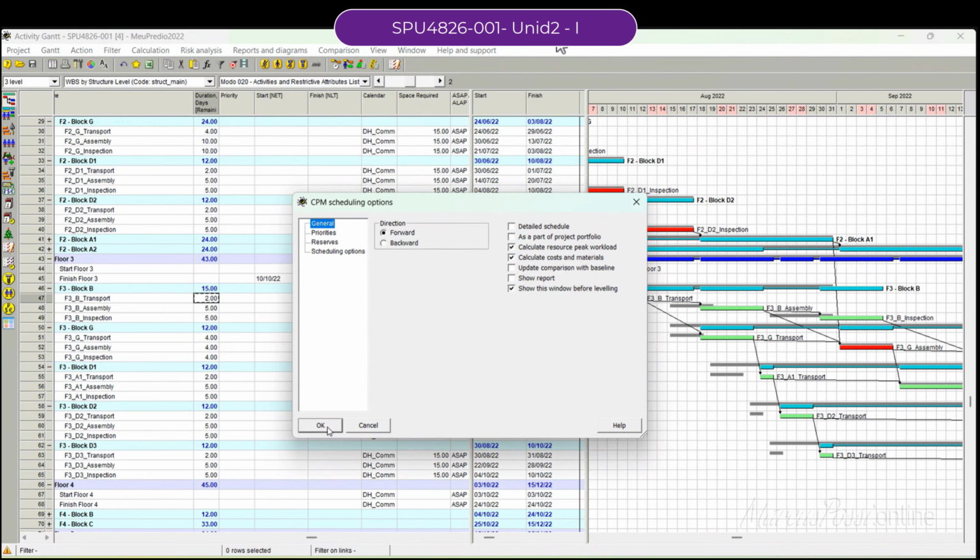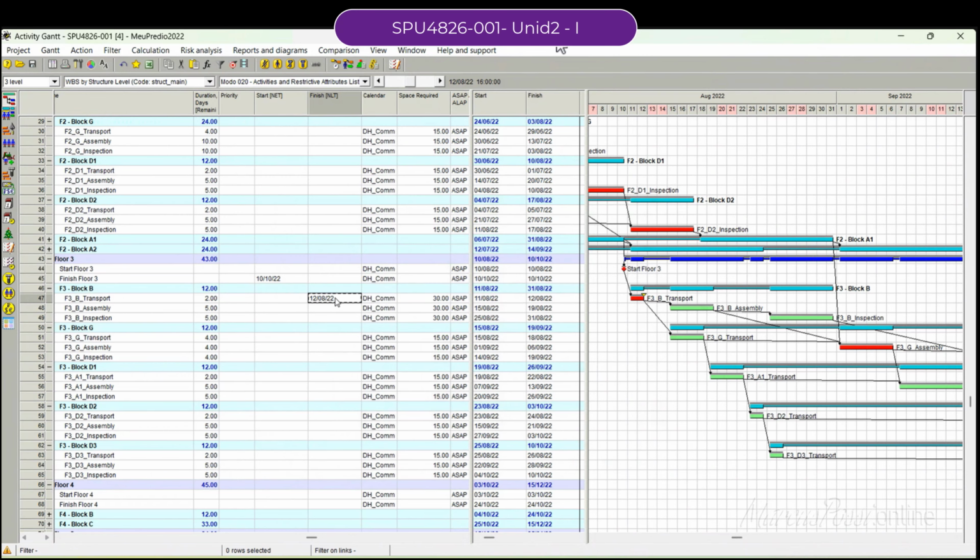But imagine you are working on a schedule and you have to change the duration of line 47. If you decide to change it, you cannot freeze your schedule. It must run in a natural way. You may see that there is a difference between finish dates and not later than. But it will not freeze your schedule, giving you a wrong target date. It will not give you wrong information. Yeah, I understand.